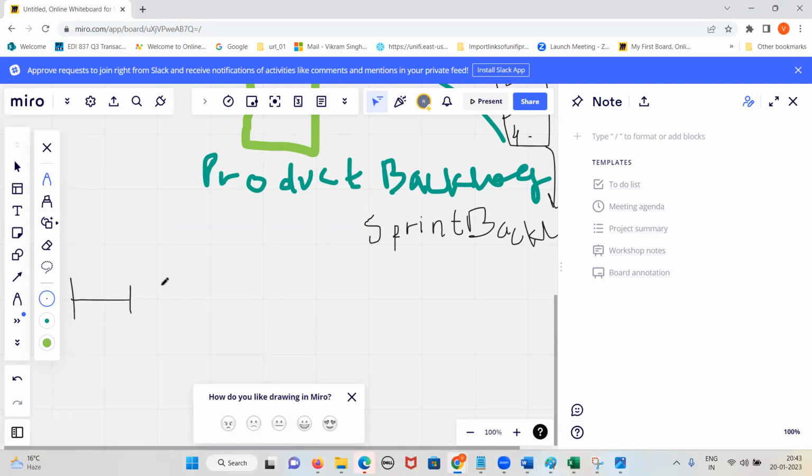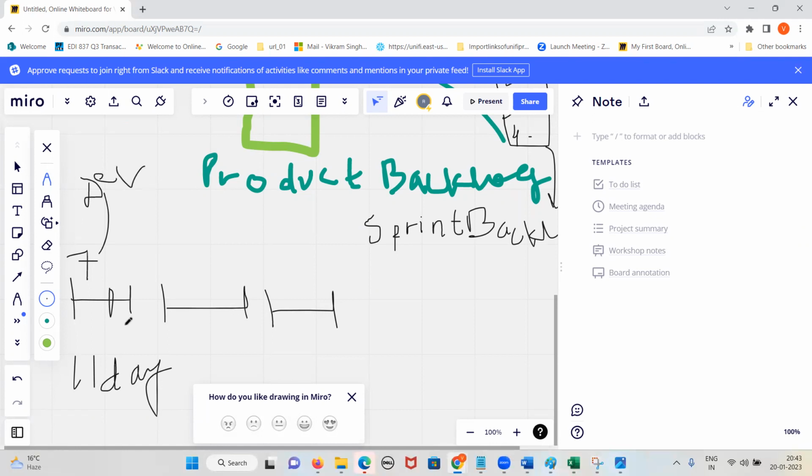This is sprint 1, this is sprint 2, sprint 3. Now these 4 requirements are getting developed. Suppose the entire duration will be 11 days for development. So 7 days will go to whom? The developer, for doing coding. And the test engineers, what will they do, guys? They will prepare documents called what, guys? Test scenarios, test plan and test cases.